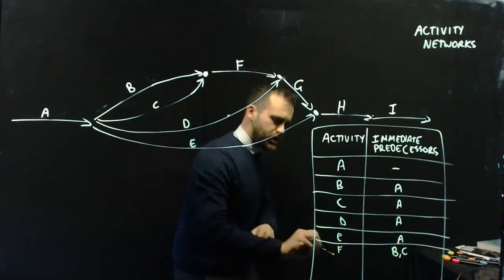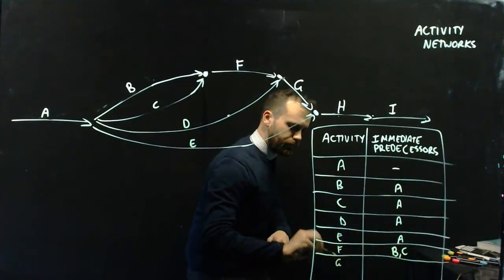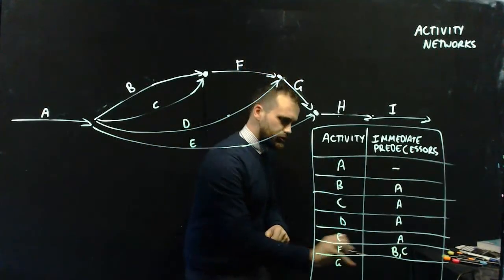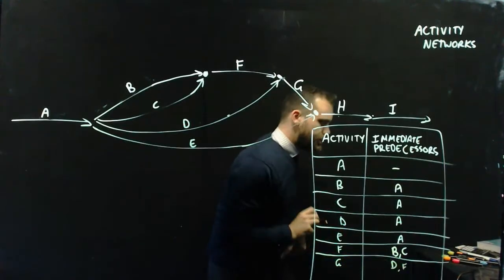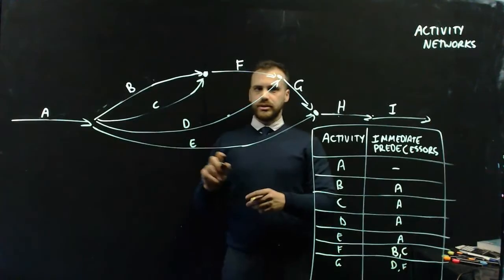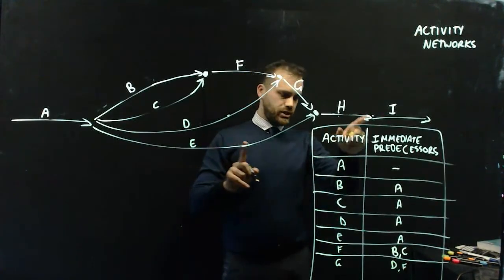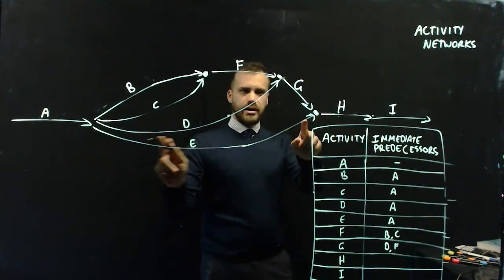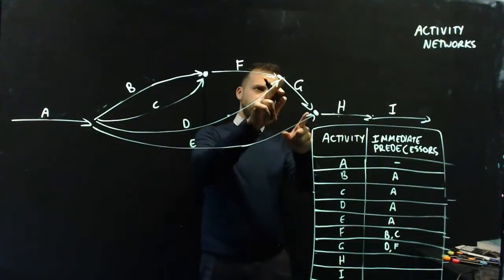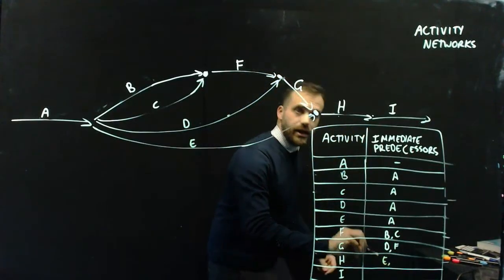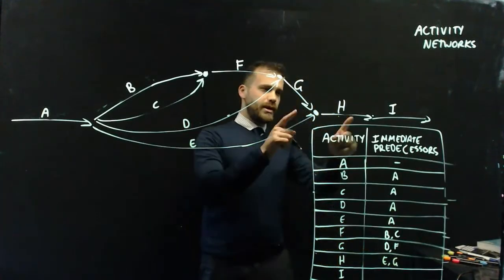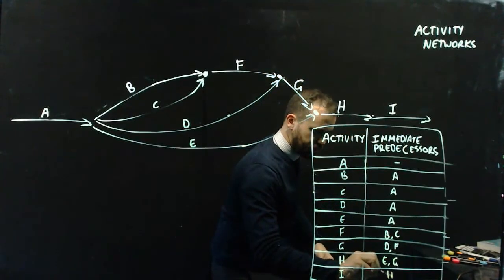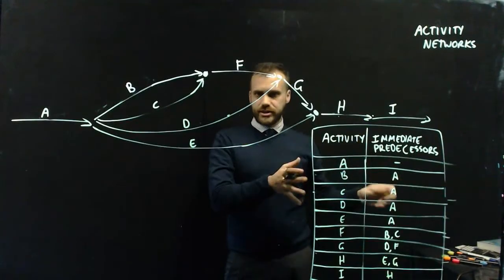What about G? G has two immediate predecessors. F has to happen and so does D. What about H? H has two immediate predecessors. We have to do E before we can do H, and we have to do G before we have to do H. And what about I? Well, the only thing we have to do before I is H. So there is our precedence table. This is our activity network, a nice way to summarize what's happening there.